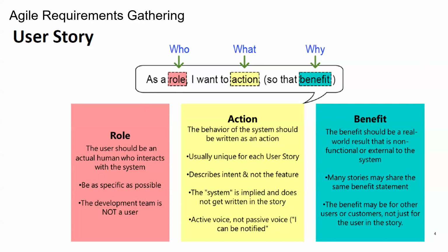As a ___, I want to ___ so that ___. So who are you in that particular project? As a customer, I want to... what is the action and what is the benefit? Let's say as a trainer, that is my role. I want to write digitally on screen. Same example we discussed in the last class, so that I can explain the concepts clearly.